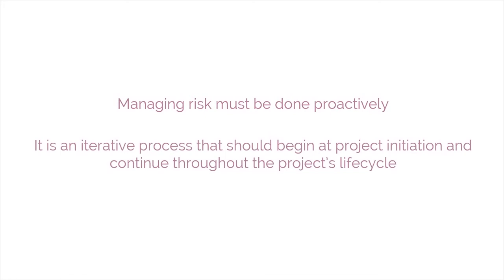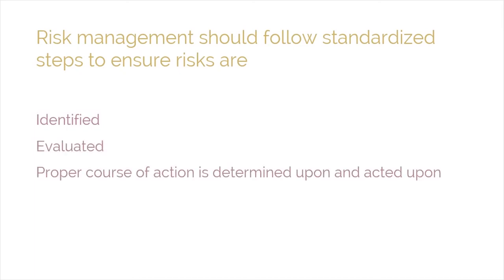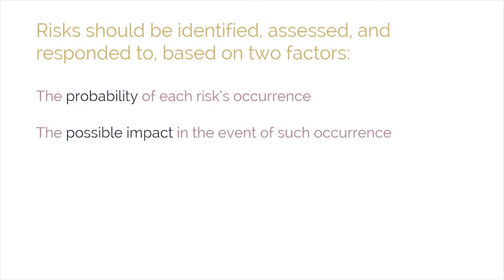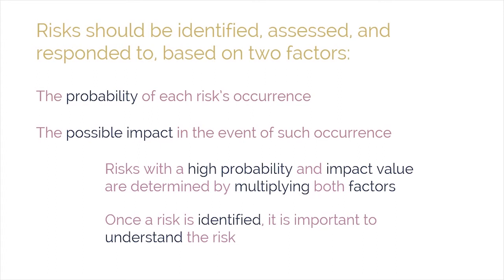Managing risk must be done proactively. It is an iterative process that should begin at project initiation and continue throughout the project's lifecycle. The process of managing risks should follow standardized steps to ensure that risks are identified, evaluated, and that a proper course of action is determined and acted upon. Risks should be identified, assessed, and responded to on the basis of two factors: the probability of each risk's occurrence and the possible impact in the event of such an occurrence. Risks with a high probability and impact value — determined by multiplying both factors — should be addressed before those with a relatively lower value. Once a risk is identified, it is important to understand it with regard to the probable causes and the potential effects if the risk occurs.